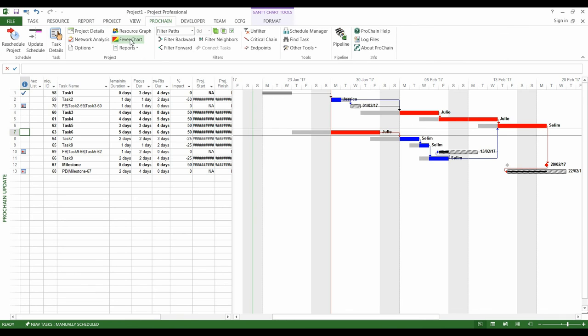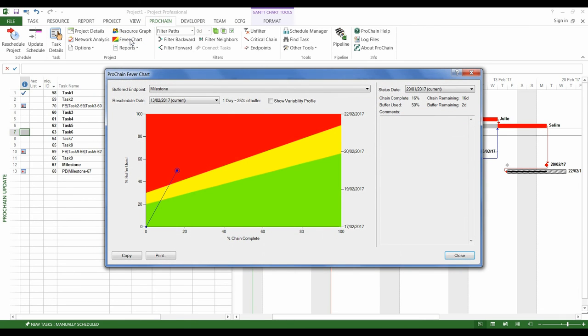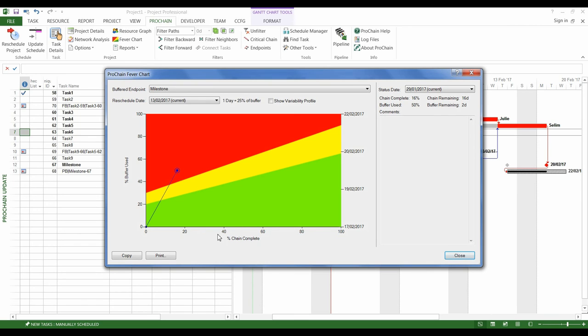Nevertheless, if we look at the fever chart, we realize that the point is in the red zone. So, what does it mean? Well, the horizontal axis represents the progress of the project, and the vertical axis shows the buffer consumption.